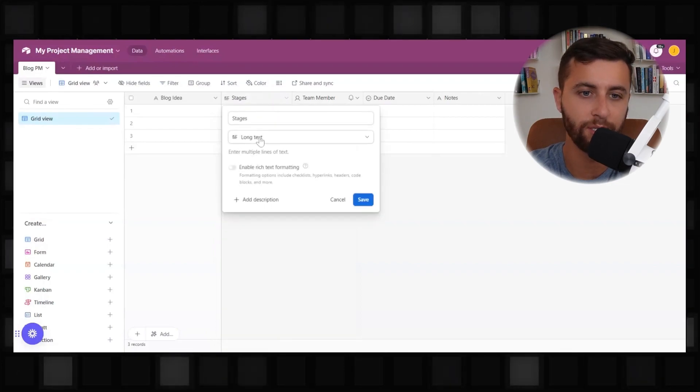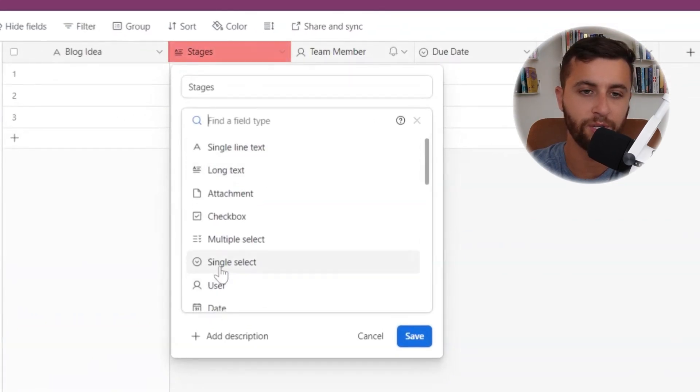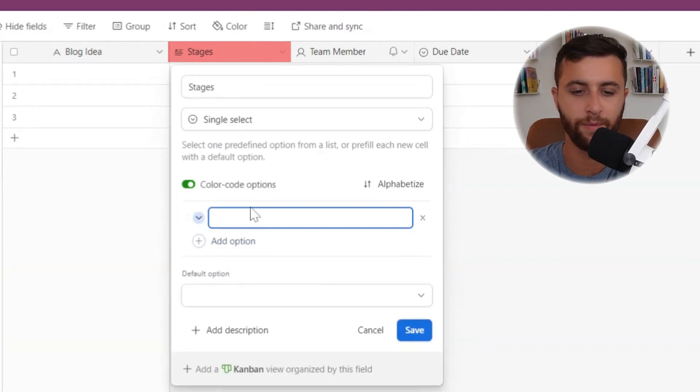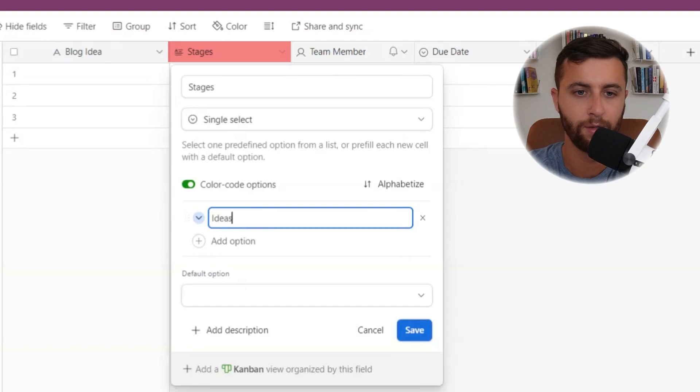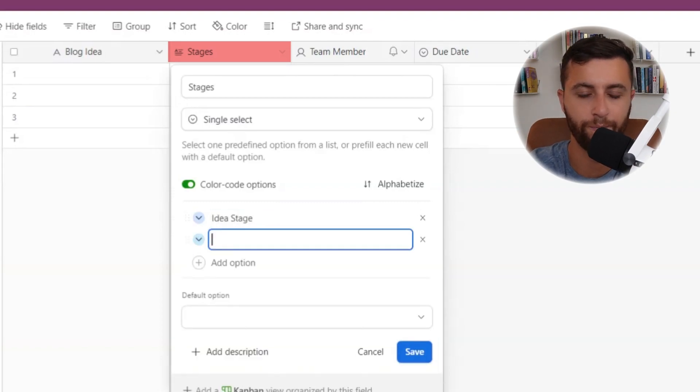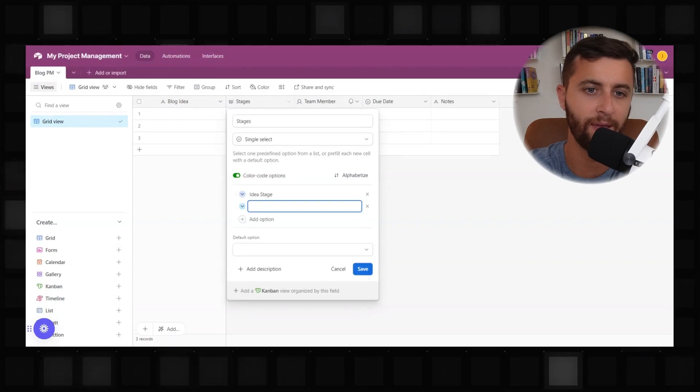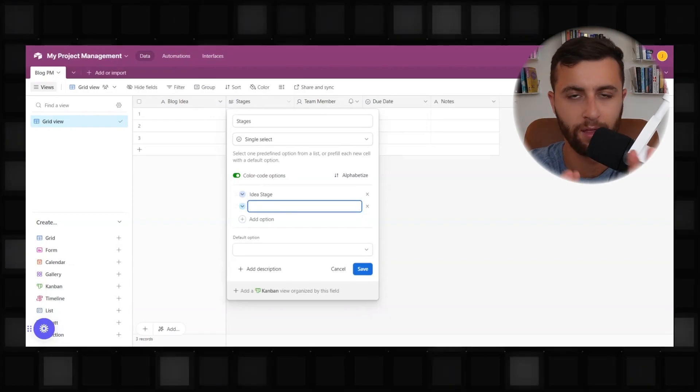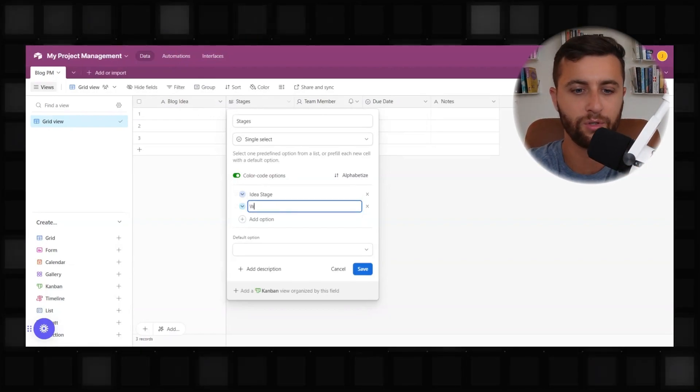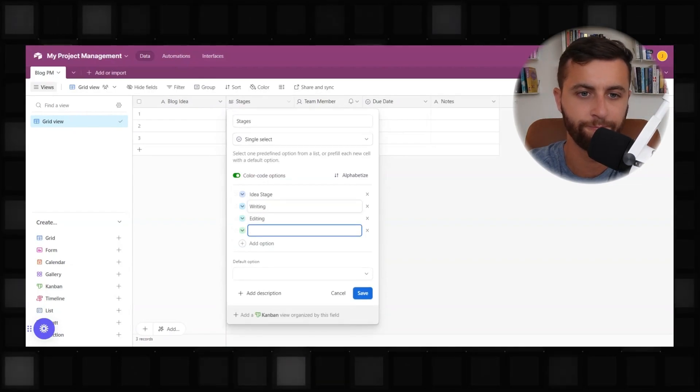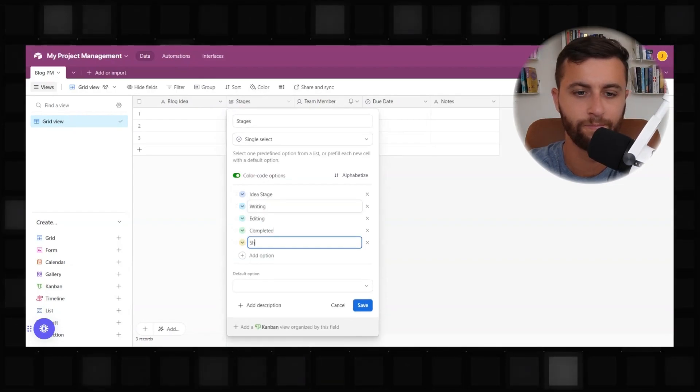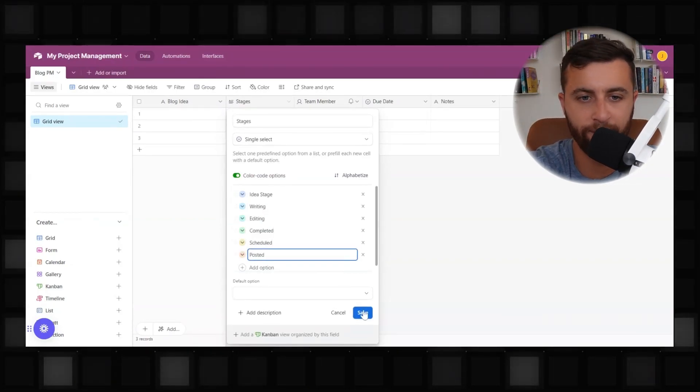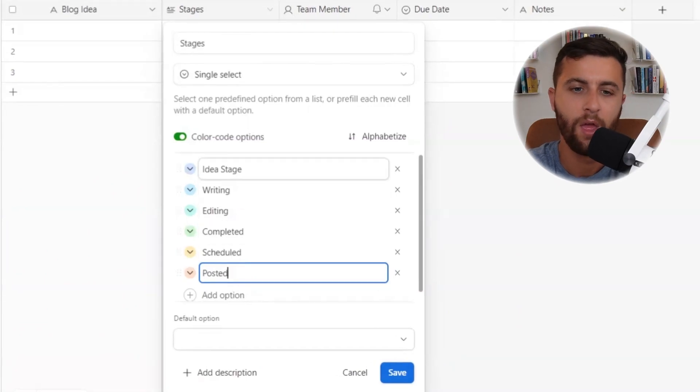So when it comes to stages, I like to have a single select option. And then I go to add option here. So I'm going to be idea stage. Going back to why I do this, when you categorize these, you don't want a blog to be in the idea stage and the writing stage. So in this example, I create five or six different stages for the blog.